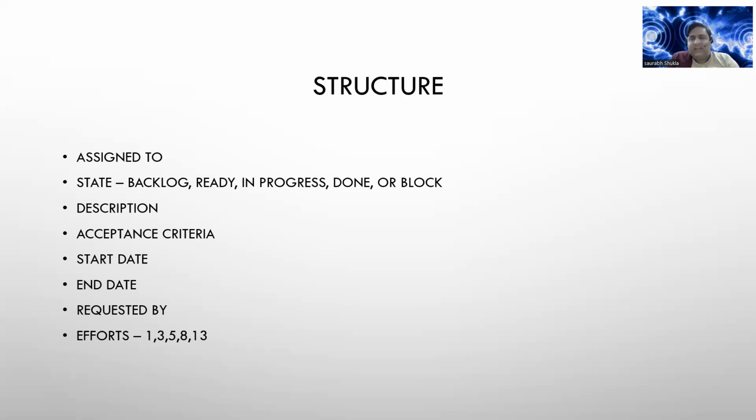effort, or you can say weightage, or whatever you want to say. That is very important, because let's say you have created a user story and you have to give some weightage there. Okay, one is the smallest thing, like give access to this database to the client. That is only one weightage, because you just have to add his email into the system and it will become a weightage of 1, or an effort of 1. 3, you might have to give only read access, not write access, or whatever kind of access he wants. 3. Then you want to give him access to do queries as well.